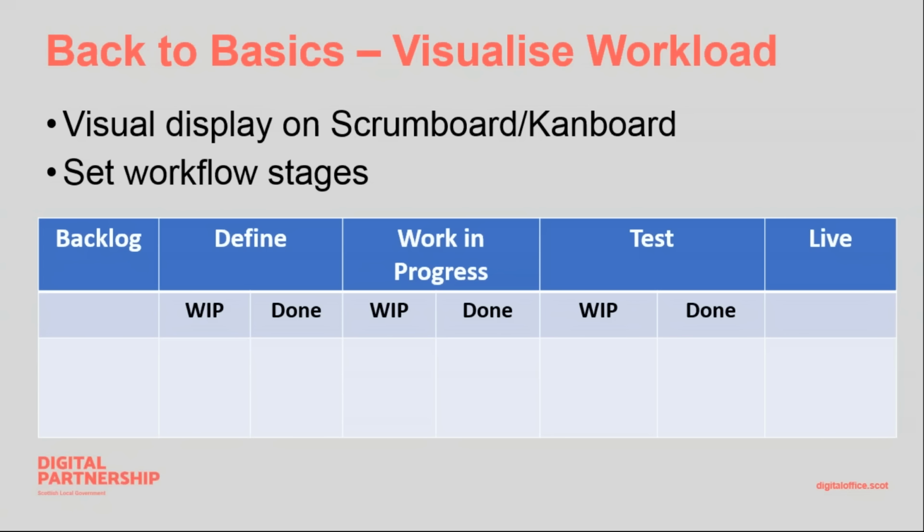Now there are loads and loads of online tools available as well, and you might want to use those if you've got very remote teams. We did start to use the virtual boards, but we ended up going back to a physical board, mainly because people just weren't updating their tasks. So do be aware if you're using an online version of the tool that you will have to keep prompting people to use it so that you have a robust system.